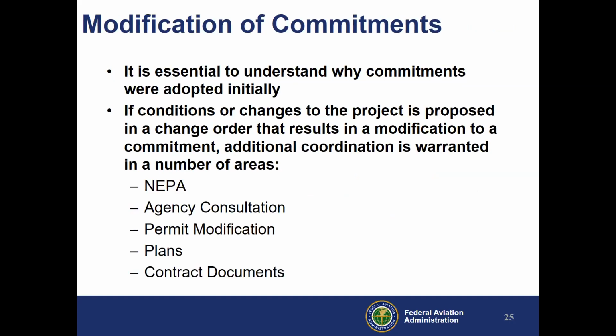If there's ever a case where there might be a modification of commitments, we need to understand why those commitments were initially adopted. If there's any changes that may come about to the project, whether it's a change order or maybe during the design, something resulted in a revision that will impact a commitment that we made, then there's additional coordination that we need to get back to.